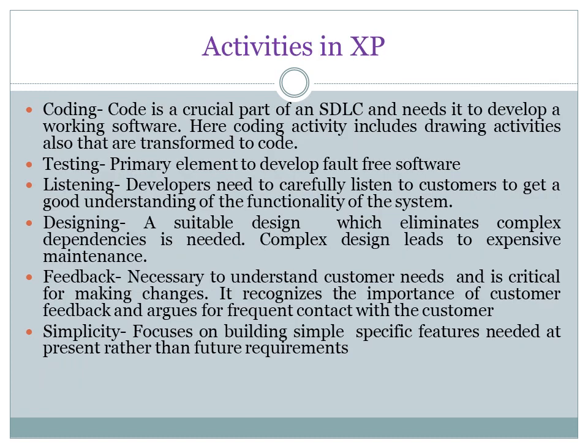So this is a comparison between the Agile model and the iterative waterfall model. In the Agile model, progress is measured on the basis of developed and delivered functionality, while the iterative waterfall model is highly structured and systematic, and progress is measured in terms of completed documents. If the Agile model is cancelled midway, some code will be available of the work already done. And if the waterfall model is cancelled midway, there is nothing to show other than some developed documents.